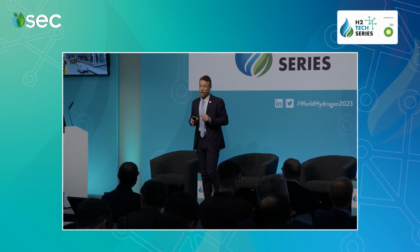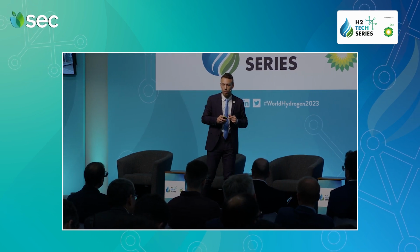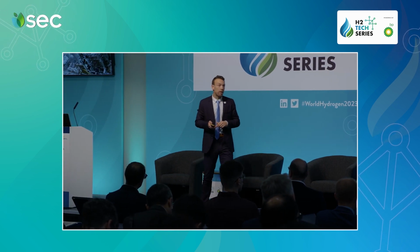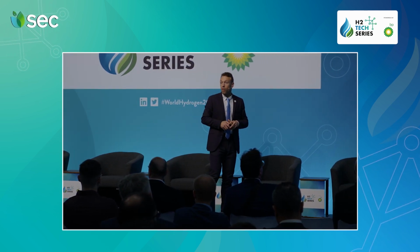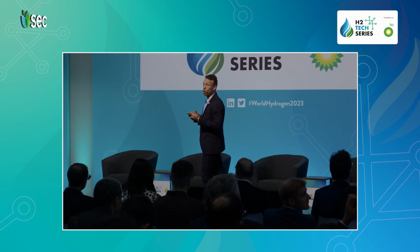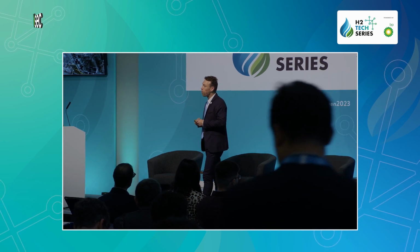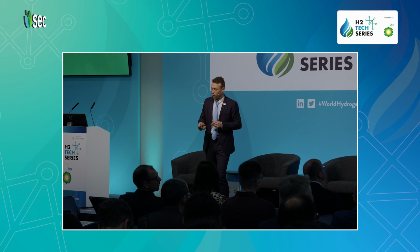end customer. Because delivering this unit, when it's one of them, that's quite easy. When it's 50 of them, that's starting to be a bit different. Stack will come from the gigafactory in the US directly to the site. We start, we build, we implement everything, we put all the different systems. Obviously, you are seeing the heat exchanger and all the resources on the skid. This skid assembler and fabrication shop that we are using since 35 years from the oil and gas industry background that we have with our engineering capability are here to support everything. So they build, they assemble the system, and then we ship them directly to site to be installed in the building where they will be.